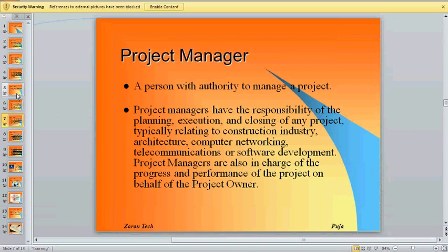Okay? So project managers, like I said, put together a work breakdown structure, meaning they figure out what the different things are that need to be done, who needs to be doing it, when each activity will start, and when each activity will end, so that they can manage time, they can manage resources, and of course when you manage time and resources, you also manage money. You know how?